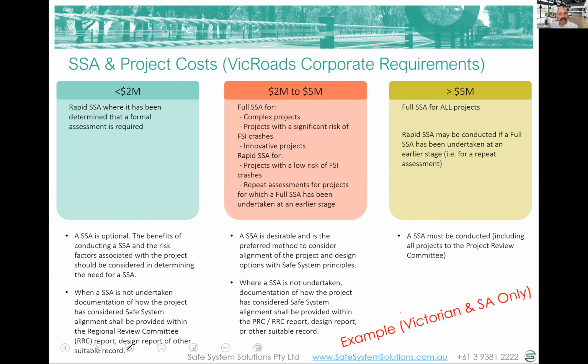In terms of when to do them, we had a bit of discussion about this, and I'm just showing you examples here of what some jurisdictions do. It's really up to New Zealand as to how that happens, and it's up to individual local governments as to what their decisions are on if they do these and when they do them. Victoria, for example, says, well, under $2 million total estimated cost of project, you could do a rapid safe system assessment if you believe it should be done.